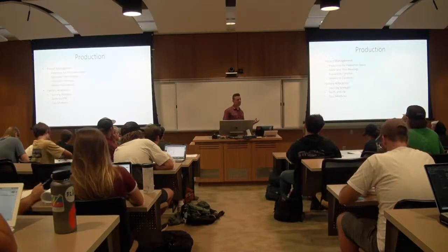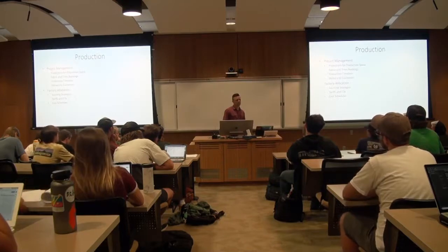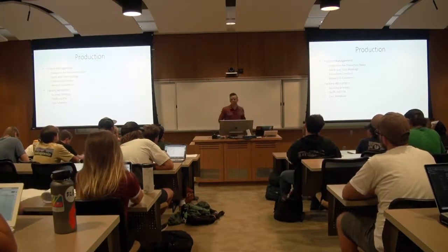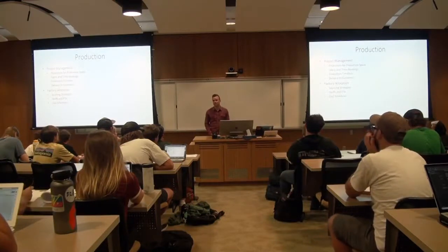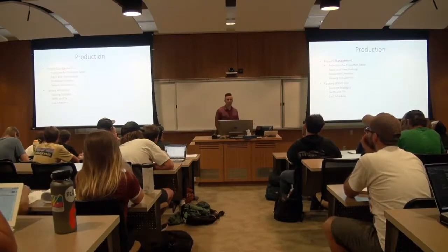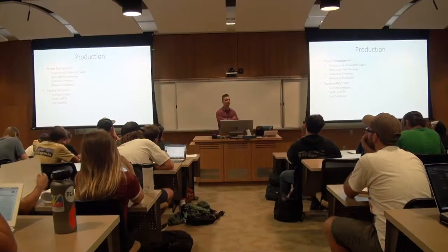And the reality is, in a super short season, if we miss something by even as little as 2 or 3 weeks, we're facing cancellations, and those goods are stuck in our warehouse for over a year. Which all affects our bottom line as well as turns goals. Our planning teams get frustrated, and all of that ultimately comes down to us making sure we keep our production on schedule.